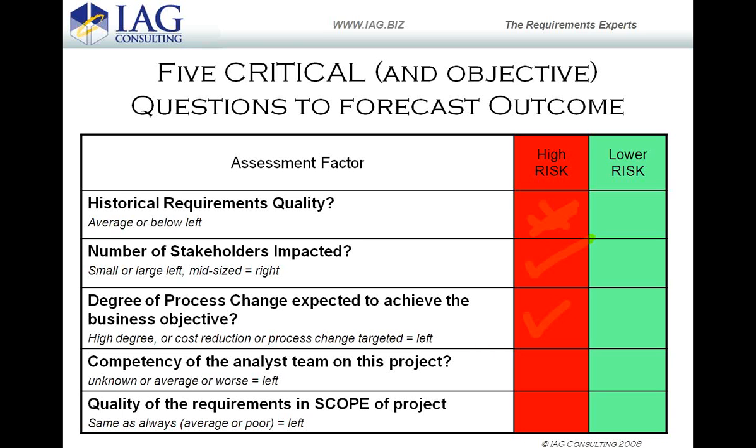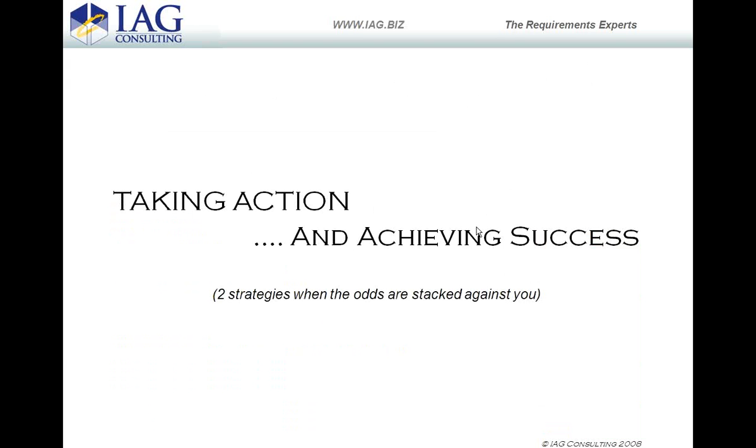But you have to call that out to your people and say, look, historically, project failure rates are very high when we're dealing with a fairly large spend for a fairly low number of stakeholders. We're going to really have to focus on this requirements discovery process. You guys are probably saying, oh yeah, but we can just do this quickly. No, you can't. You need to focus on doing it very, very well and set that expectation. Use the data here to help you manage stakeholder expectations on the project, okay?